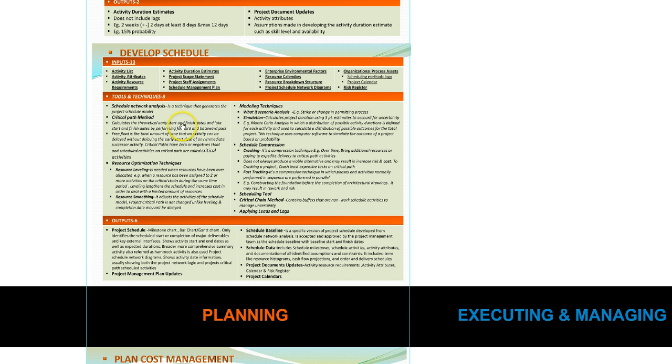And the name of the document is called the project schedule, right? That's an output. So it will have milestones, it will have Gantt charts, it identifies the start or completion dates for major deliverables, key interfaces, and again, it even has the network diagram. So all that goes into developing the schedule.